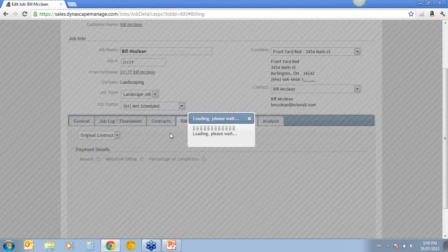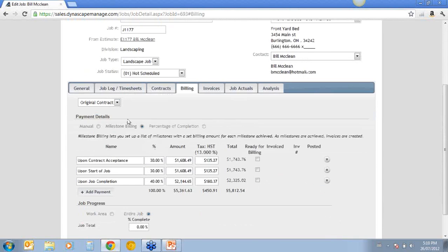On the billing side, there's just a little bit of new stuff here. We have the same drop-down menu. So for change orders, we actually allow you to bill separately and encourage you to bill separately because you don't want to have the billing confused and you want to make sure everything's regimented properly. A lot of the times if it's a one-off tree or something like that, that's going to be the change. You may not even be billing any money, but you want to create an invoice and make sure you're accounting for that. So if some of the changes get to be too much, you can start charging the customer. So we'll see later on some of that.